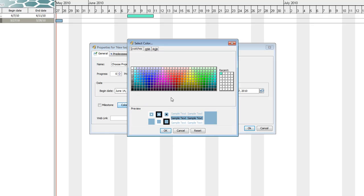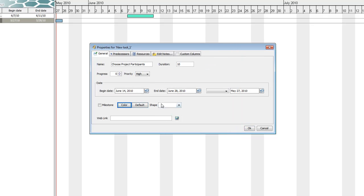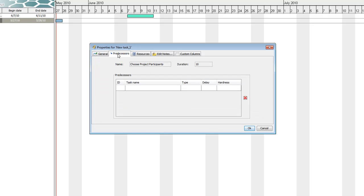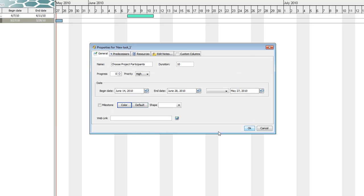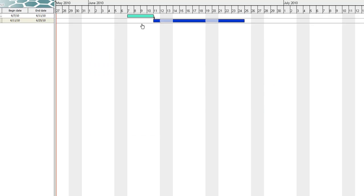I'm going to color it, let's say a deep blue to differentiate it. Now if I want to connect it to a predecessor job that needs to be finished, I'll click on predecessor up here. And right here it will have ID, task name, type. You want to click there and connect to the prior job that you wanted completed. So the only job that's available right now is create project files. So I'm going to click on that. And now it's officially a predecessor. If there's any sort of web page that is related to this job, you want to put that in here. And then press OK and automatically it marks the first job as the predecessor.